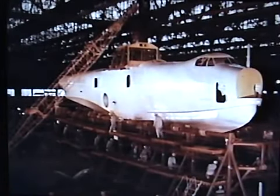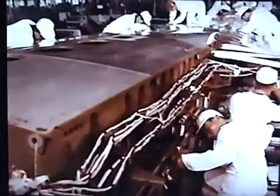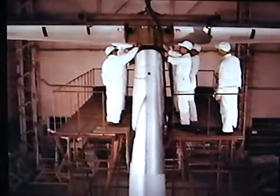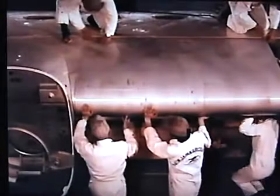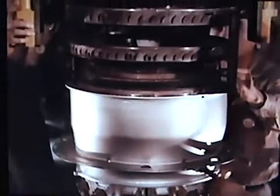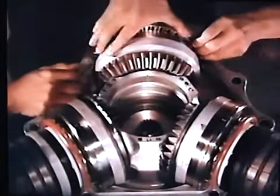Complete production contract arrangements have been concluded with a group of well-known Japanese aircraft manufacturing companies. The outer wings and tailplane are manufactured by Fuji Heavy Industries. Japan Aircraft Manufacturing is responsible for the center wing. The engines are manufactured by Ishikawajima Harima Heavy Industries under license from US General Electric. Sumitomo Precision Industry is in charge of the propellers.